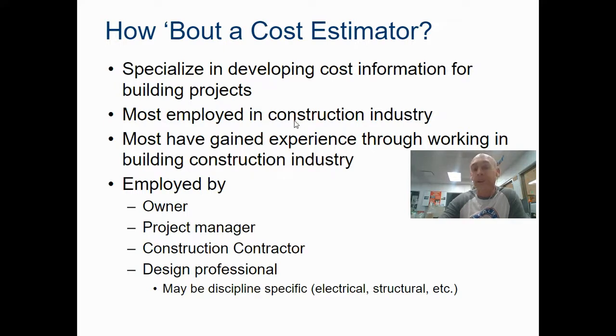They're employed most often in construction industry because you might have a large multi-million-dollar project that has lots of individual pieces. So you have to figure out what is the total cost for the project, and then you have to submit that to people who want the work done. And they will take 3 bids, usually if it's a government job, and then choose one. Oftentimes that's the least expensive. But if you're the bidder, you don't want to underbid because then you're not going to make money. So it is something that if you have a lot of experience, then you can be really helpful to the industry. You only get that experience if you've been in it for a while.